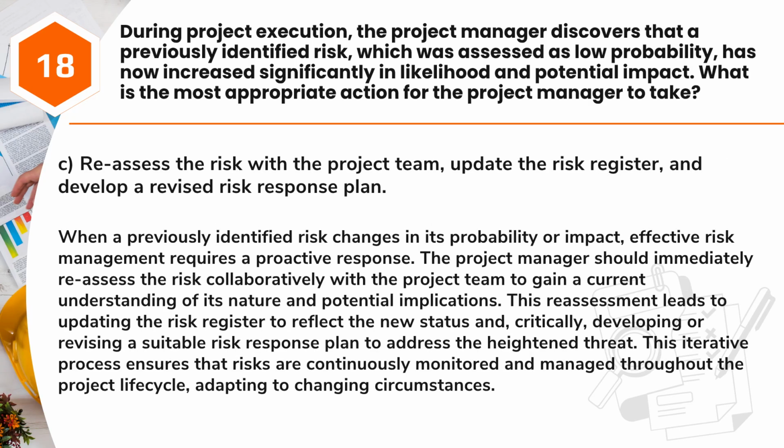Answer: C. Reassess the risk with the project team, update the risk register, and develop a revised risk response plan. When a previously identified risk changes in its probability or impact, effective risk management requires a proactive response. The project manager should immediately reassess the risk collaboratively with the project team to gain a current understanding of its nature and potential implications.